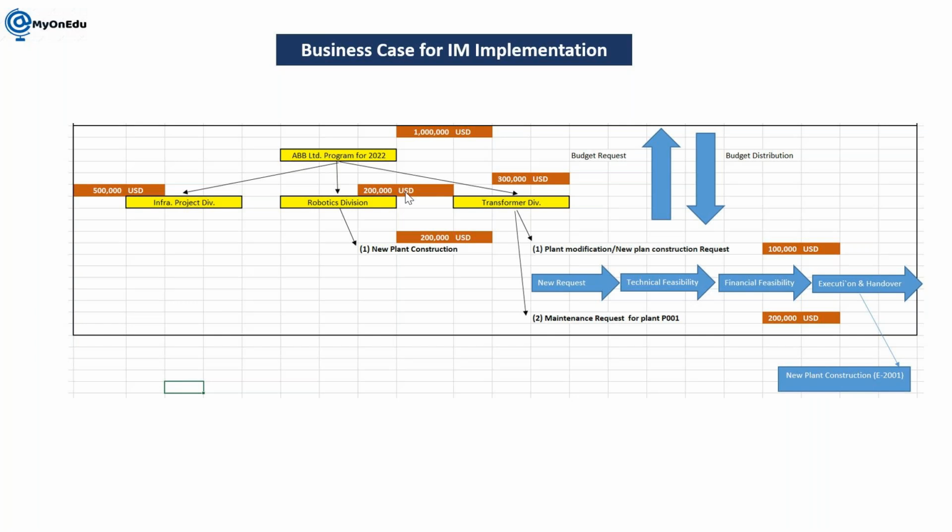Then it comes to that particular state, then it is distributed further to the district level, then to the project level. So how exactly does it work? First the proposal is submitted, then it goes to the next level for approval, and further approval. Once the estimation is approved, then it is distributed. So bottom to top is my budget and cost estimation, and top to down is my budget distribution.